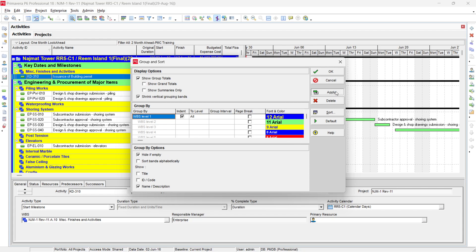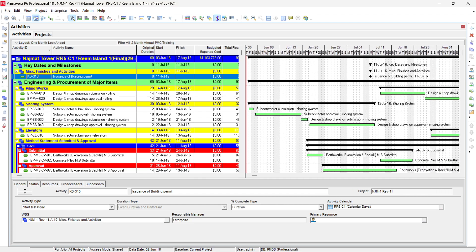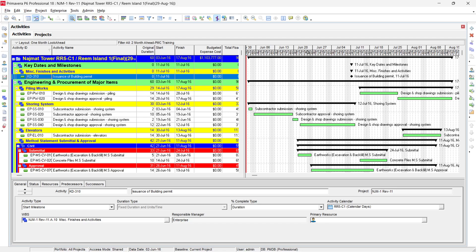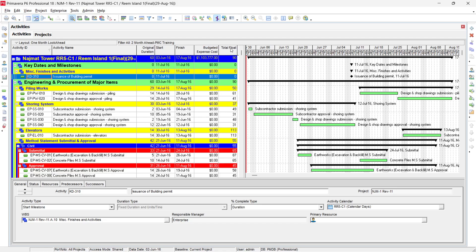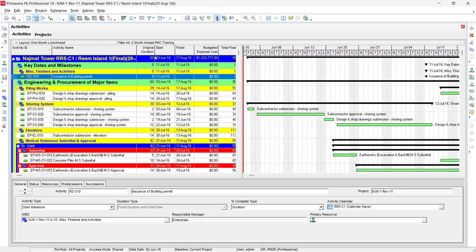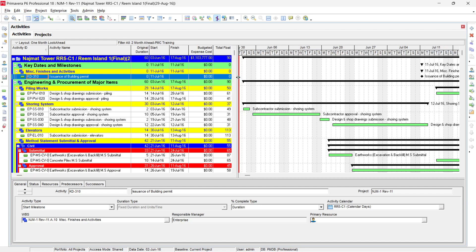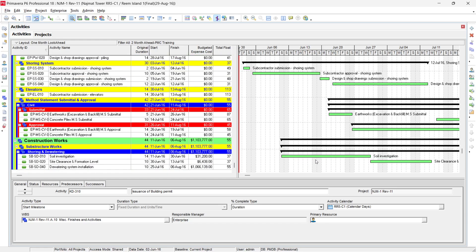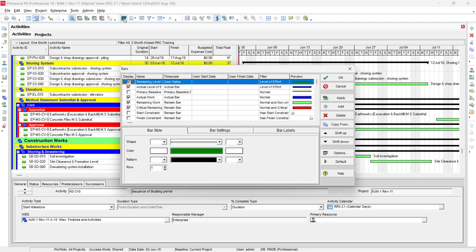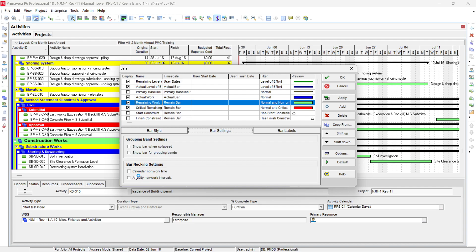You may need to adjust the view to show the days properly, as more space is needed for daily display. Now this is your two-month look-ahead. To show non-working days within the activity bars, go to Format Bars. Select the remaining bar, go to Bar Settings, and enable Calendar Non-Work Time — this is called bar necking. Then click Apply.